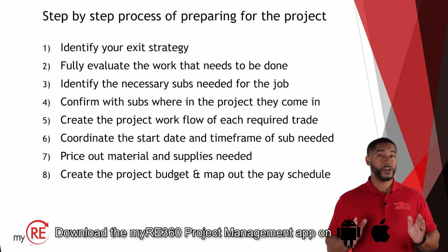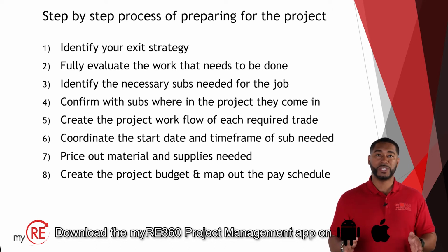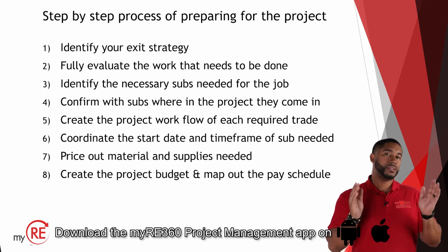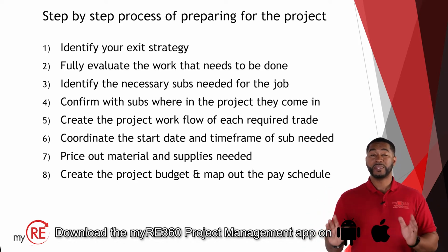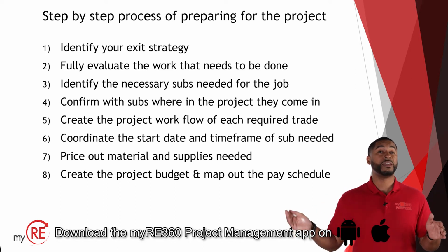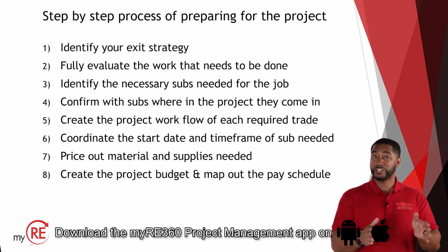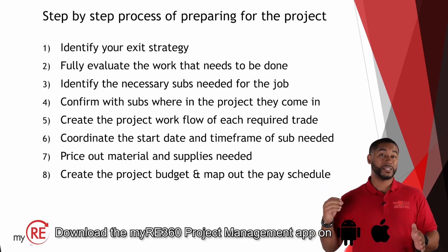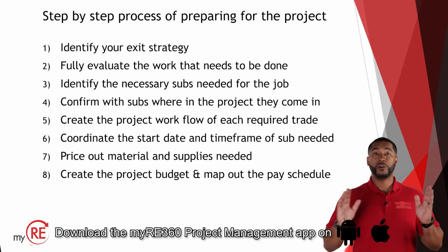Again, very, very important task, because if you're managing your own project and being your own GC, you're going to have to manage not only the cost of the material, but the pay to your subcontractors. Now, if you're using a hard money lender or a private loan in which you're getting money from your lender, it is important to make sure you have the conversation with these subcontractors on if their pay is susceptible to a lender draw.